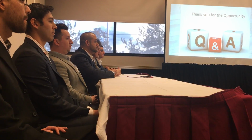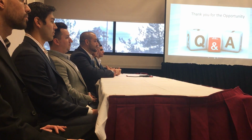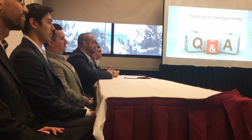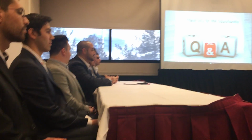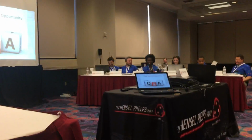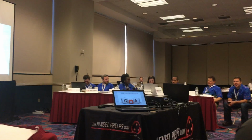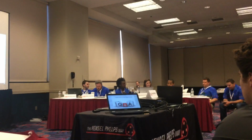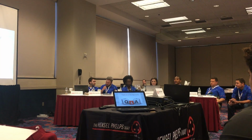What if they're not fine? We would have to schedule more time for that. I think you had some days in there anyway. Yeah, but it's always good to put that in there because you have that one day before final completion. That's gonna be a busy day. That's good. I see what you're doing. In most cases, you hope that the architect engineers, most times they're on our side, hopefully, but you never know what the owner's gonna say. So you wanna build in a little bit of play to go back and do some work, especially to bring them back for a back check. But you guys did a good job on this.